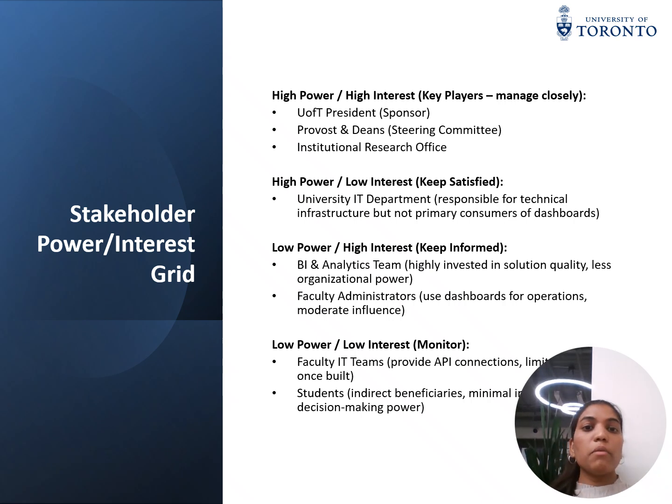Low power but high interest groups are the analytics team and administrators. They should be kept informed. Finally, low power and low interest groups are students, who will just be monitored since their involvement is indirect.